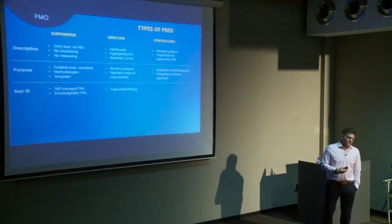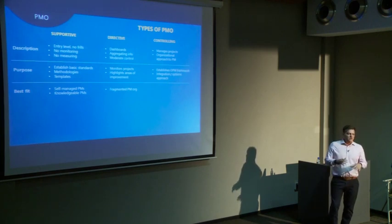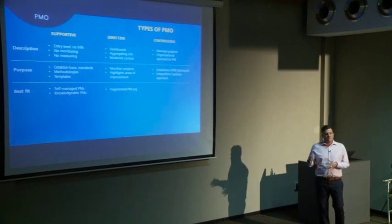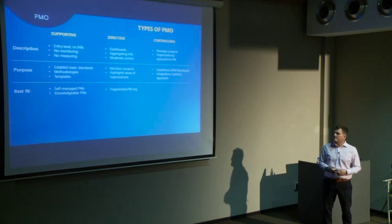A directive PMO, to me, is more where the organization has a fragmented way of managing projects. So the directive PMO might assist in monitoring and controlling everything that's happening in that PMO, but projects are usually fragmented. They're not really related to each other. There's no real integration. That is probably where a directive PMO is the best fit for you.